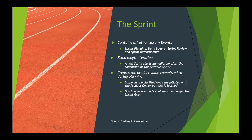Now let's go into some detail on each of the events. The sprint is a container for all of the other events. It is a fixed length of one month or less, and the next sprint starts immediately after the previous sprint ends. The result of the sprint is the creation of a done increment representing value to the stakeholder.